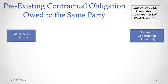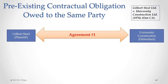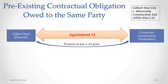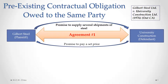In that case, we have two agreements, and they both involve the same parties. One party, the first party, which is the plaintiff, is Gilbert Steel, and the second party is University Construction. Gilbert Steel was a supplier of steel for construction, and University Construction was the general contractor. Agreement number one between these two parties involved a promise by University Construction to pay a set price for the supply of steel by Gilbert Steel.